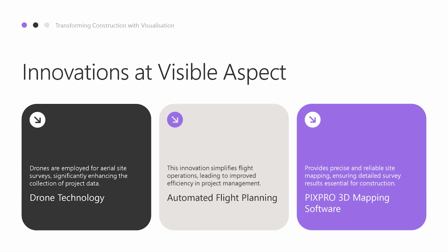The drones now just go up. It's all set beforehand, autonomous. So we'll start the mission. The drone will then go up, collect all the data we need. Only come back literally for us to change the batteries, and then we'll just watch it through the sky as it goes through, does its job, comes back, and then we take that data, put it into the system, and then just crunch everything together and get all the deliverables from that, which is all then passed over, sort of a BIM.